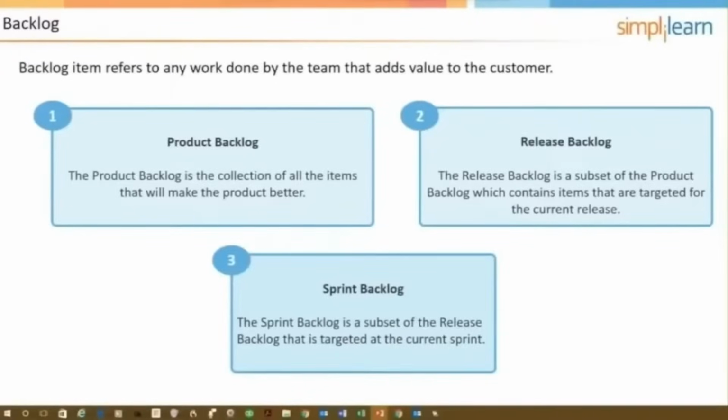Okay, artifacts that we use when it comes to Scrum. We've talked about the product backlog. We talked about the sprint backlog. There's also a release backlog. Depending on the size of the project, it might be advisable to group user stories into releases. If you have a product roadmap, your releases would line up for that.